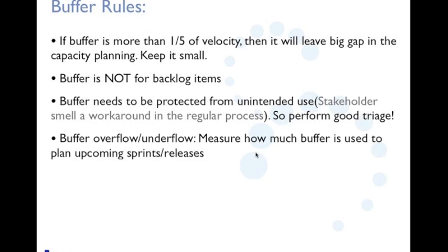Then instead of following 80/20, after a couple of sprints I may start following 85/15 kind of capacity. So 85% for planned work and 15% for unplanned work. So this is how you can actually tweak. You need to learn from what you have just done and try to tweak it in the upcoming sprint.